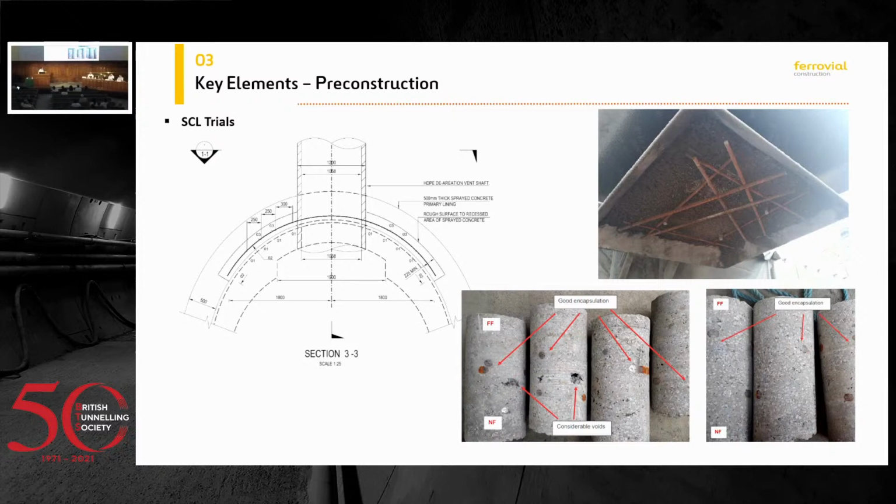And this was a fight for me, because I remember this was the first trial, having a discussion with our lead miner. He wanted to put the accelerator higher, and I told him you need to start lower with the accelerator to make sure that the encapsulation is good enough, then later you can start turning up. Well, he didn't let me follow my advice, so we started at 5.5 and got up to 7.5.